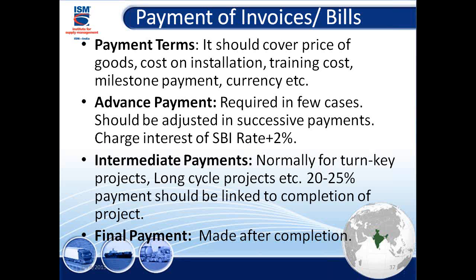Next comes advance payments. I know in the public sector it happens; in the private sector I have rarely seen it. If you pay an advance payment and you're charging an interest rate on it, I've never seen that in the private sector, but in the public sector I know it happens. They charge you the interest. If they give you a 20% advance, they charge you interest on that plus 2%.